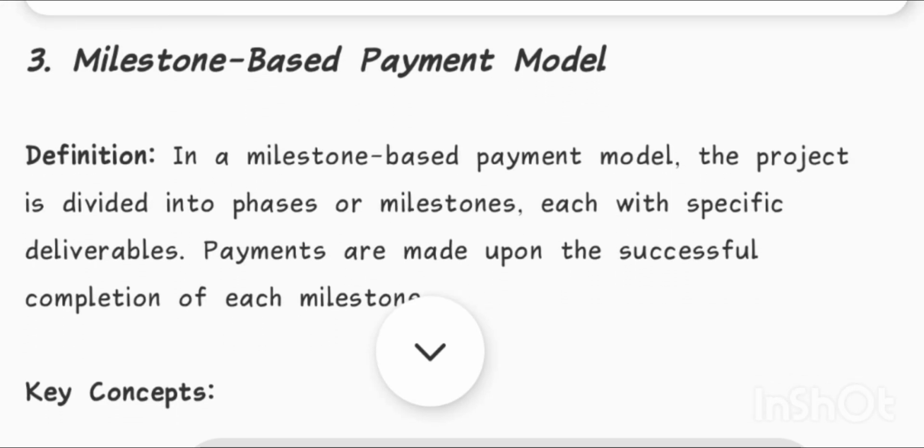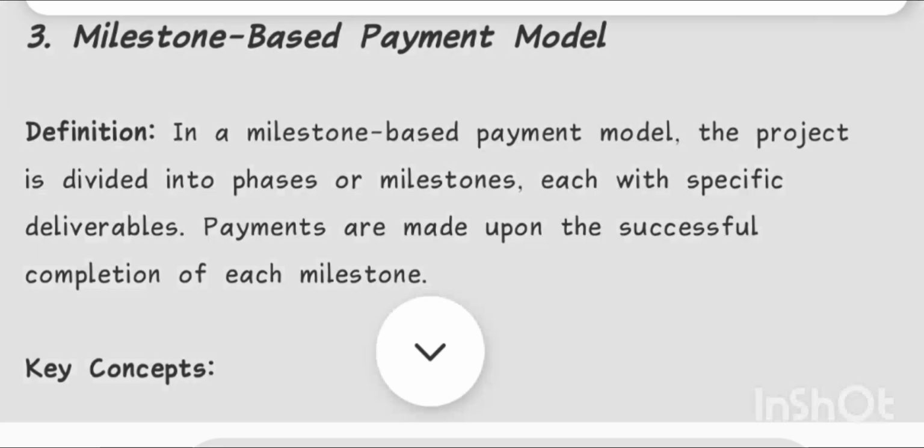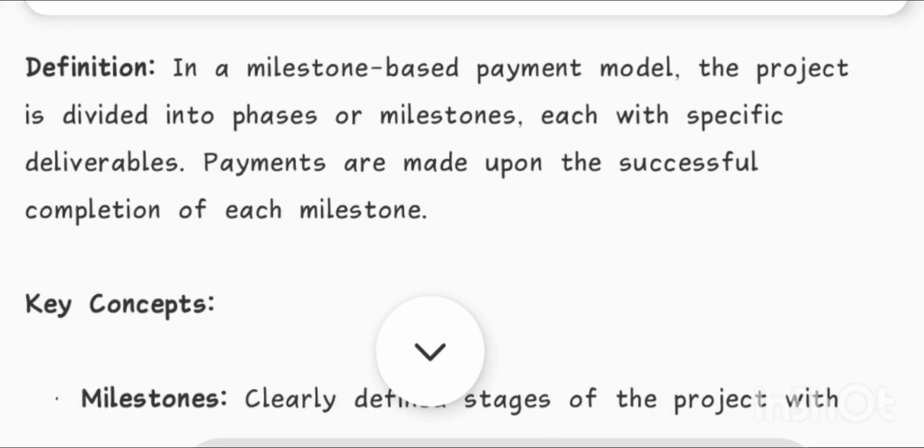3. Milestone-based payment model. Definition. In a milestone-based payment model, the project is divided into phases or milestones, each with specific deliverables. Payments are made upon the successful completion of each milestone.